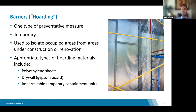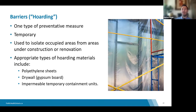Occasionally, mobile containment devices called cubes are used. Picture an old telephone booth — contractors or maintenance staff bring this containment cube to where they're working, push it up against the ceiling or wall, and it contains the work within that temporary structure. For example, when removing a ceiling tile to repair a valve or replace a pipe, this allows work to be done safely. You should not see anyone removing ceiling tiles without this or other measures in place.